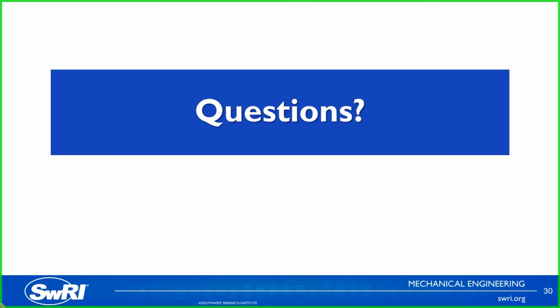But at least get the initial thoughts of, hey, we're going to need to measure the power output to make sure that this works, and we're going to need to measure this. Then in the detailed design especially is where you really want to nail down your test setup, which is still before you get your final design. You definitely want to be thinking about that and have a pretty close to finished test setup done.